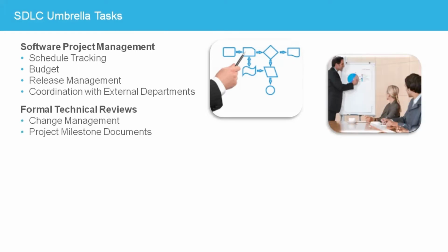A project is controlled and evaluated through a series of formal technical reviews. Reviews are used to formally accept artifacts, signifying a phase of the SDLC is complete. These artifacts are normally a document, such as the requirements, design, test plan, or test documents. They may also include diagrams laying out the system or database design. Review participants are qualified team members and stakeholders who determine the completeness, accuracy, and suitability of a project artifact.